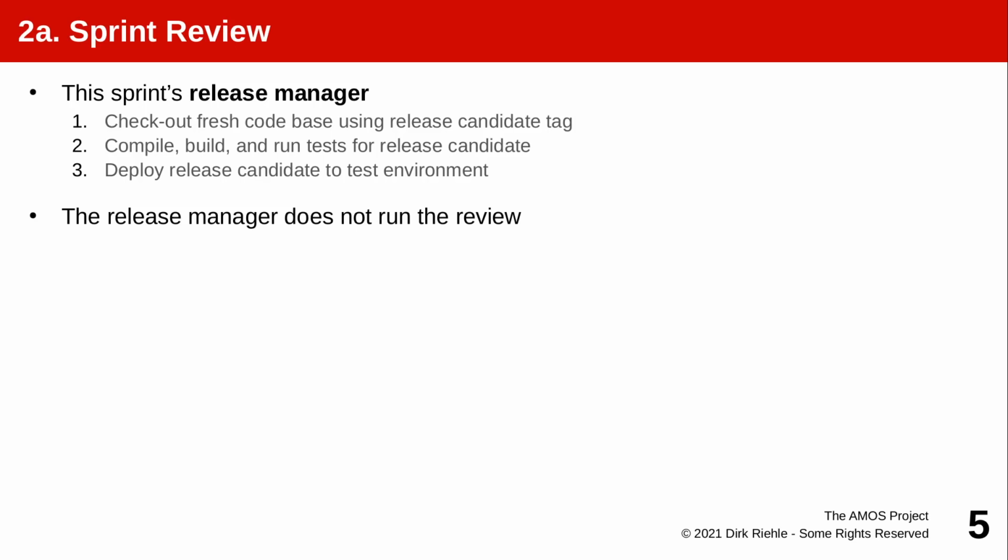Also, since release manager as a role may change between people, different people may get to do it, which is great, because then you will know as a release manager whether the software builds on your machine, which in turn only will be the case if you really have agreed on the proper working environment and ideally fully encoded it in the build scripts in the build environment so that you don't run into a works on my machine but not on yours, but rather can consistently and independently of context build the software.